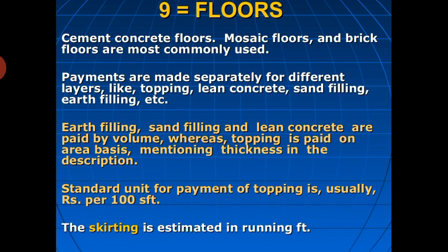the floors. Like if you use the tiles, below that we are using sand, below that we are using some of the laterite layer. So for each layer, the laterite layer thickness, how much quantity, how much after the sand, how much quantity is there, what is the thickness, that calculation is separate. Usually it is a square feet unit.